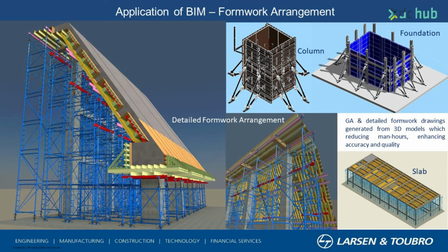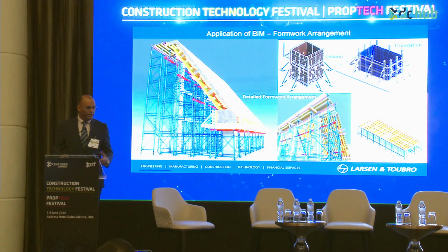Formwork is also now different. In earlier days, the site construction team used to analyze and do their own formwork designs, but now with the digital twin, you have them all on the drawing table much ahead. You exactly know what material to order, what kind of formworks to create, and this definitely makes the construction safer on site, and definitely on time, because you don't have to do hit and trial on the construction site.